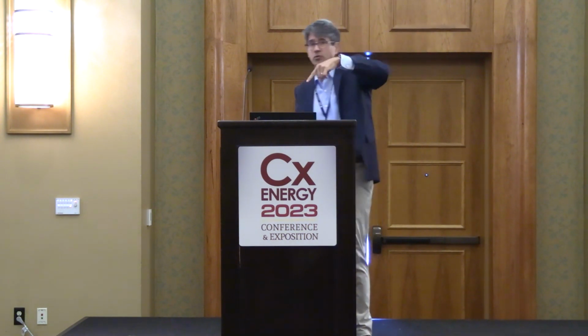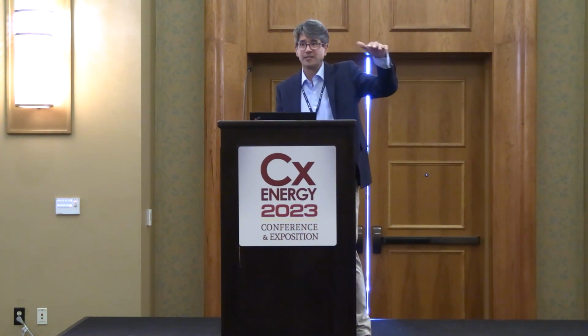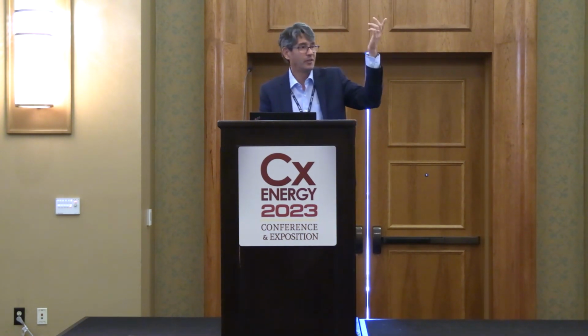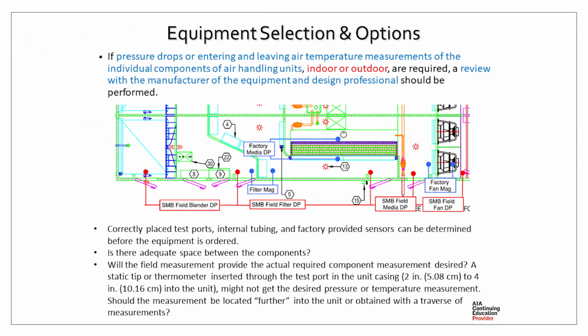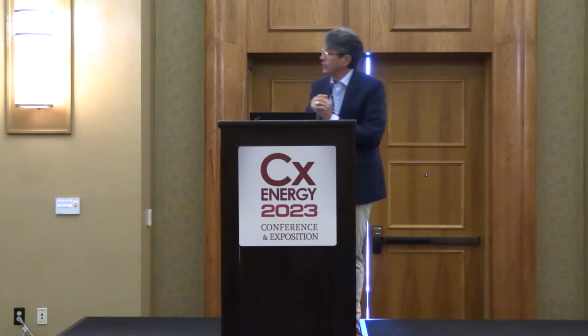So the old adage is, well, you should have done it all before we got the ceiling in. The outlets weren't installed until the grid was in. You run into some coordination issues in that scenario, and everybody starts thinking, oh wow, we didn't think about that. So things like that, when you look at those drawings, sometimes we have to look outside the scope of our mechanical drawings and look at the architectural drawings and see what we have. Like I mentioned earlier, on equipment selection, a lot of times you get everybody together and start looking at that, getting the suppliers involved early, before they order the equipment. Here's a kind of messy drawing of a unit, an evaporative cooling unit.